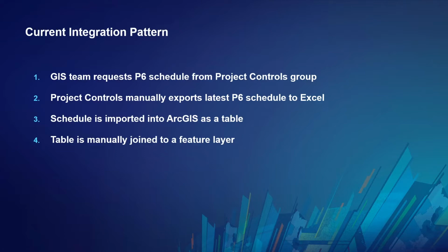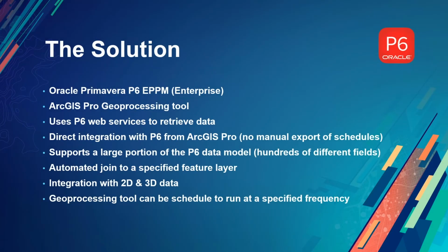For our solution, we didn't aim to tackle the whole data model and bring everything in. We focused on what we thought is important to our users: projects, work breakdown structures, and specific activities in those breakdown structures. So our solution focuses on Oracle Primavera P6 Enterprise used by lots of firms. This integration is represented as a simple geoprocessing tool in ArcGIS Pro.